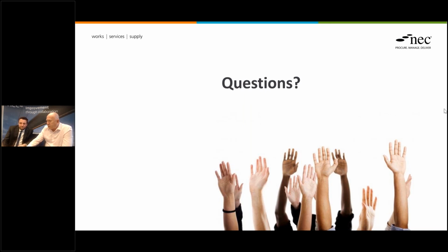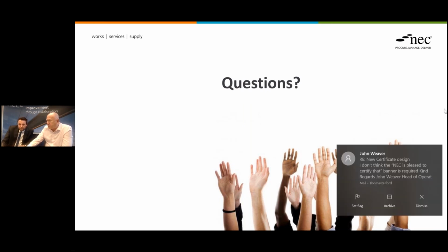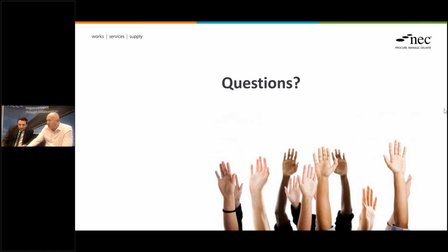Okay. Next question. Core clause 15.2: Subcontractor attends an early warning meeting if attendance is required. What is the time period? Have had PM requesting a very short time, less than a period. So there are no time periods. This is professional judgment, isn't it? Some early warning meetings are drop everything and meet now, and that does mean in person.